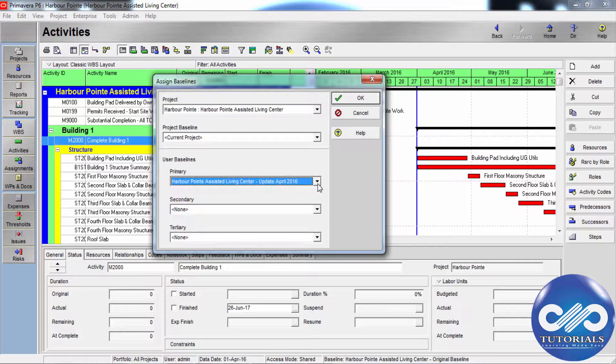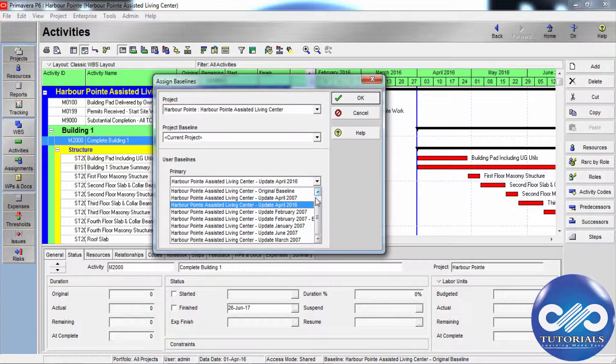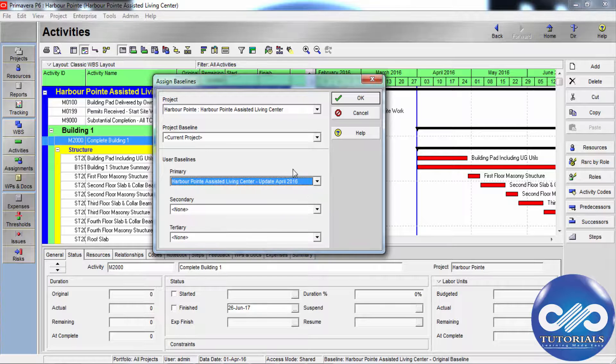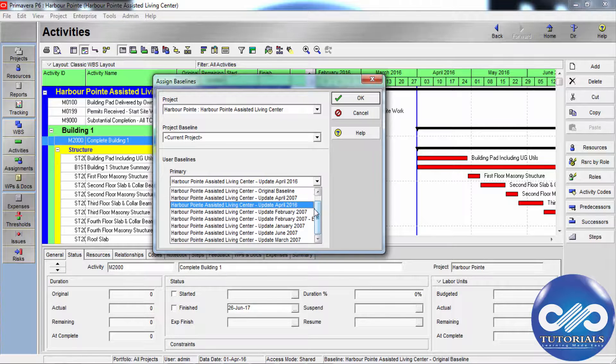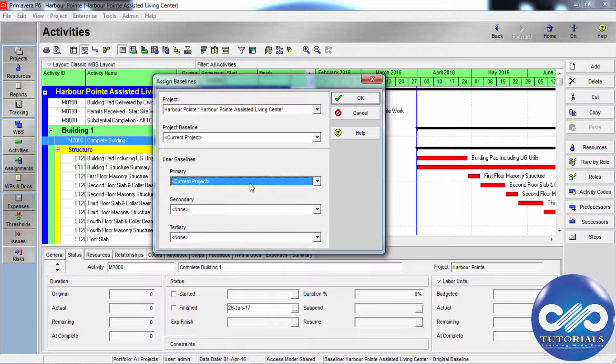To use an existing baseline as primary baseline, select an existing baseline in the primary field. If you do not select a value for the primary baseline, the current project is used as the primary baseline.